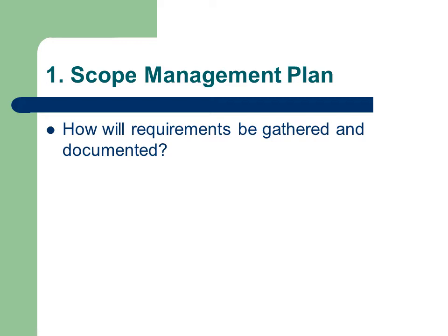The second important component of the Scope Management Plan is a description of the procedures you will use to document and obtain approval for any changes to scope. This is called the change control process. We will discuss this in more detail a little later. Finally, you should plan how to review the success of scope management for the project and how to incorporate this into the post-implementation review.